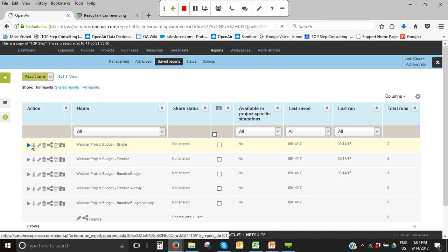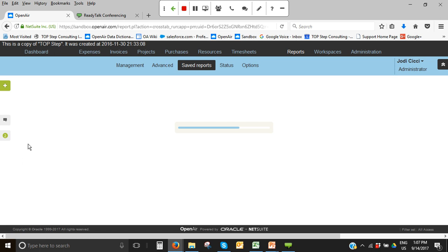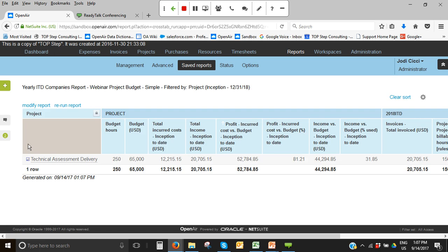And I wrote a simple little report where you can pull the basics from the system and kind of highlight some of the basic reporting values that you may or may not be aware of in the system when you have a simple budget. Things like not only what the budget hours and budget money is at the project form, but there's some standard detail fields that you can pull into reports that really report on current burn against budget for cost and against budget for invoicing. And they rely on the invoice aspect of the system, not the revenue aspect.